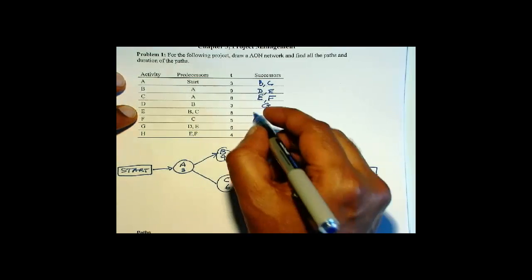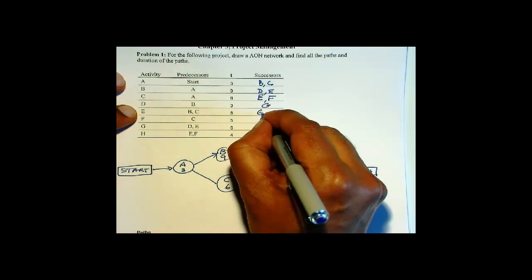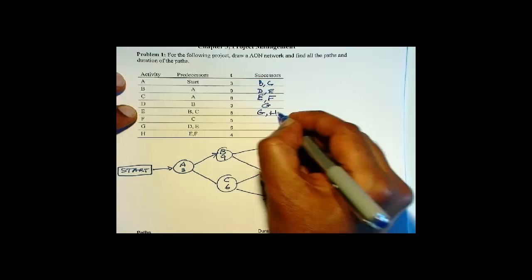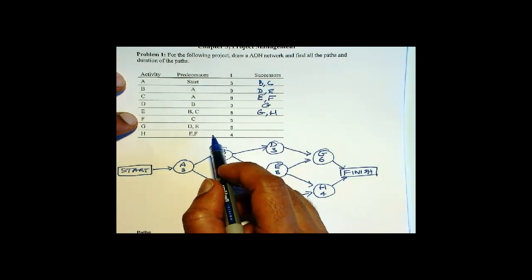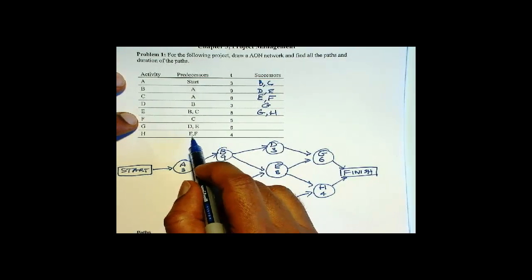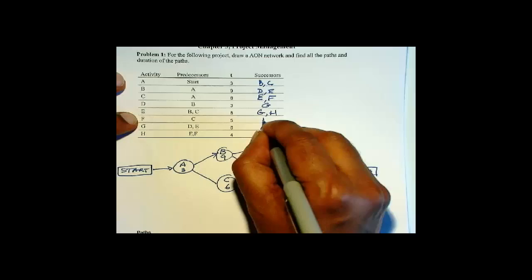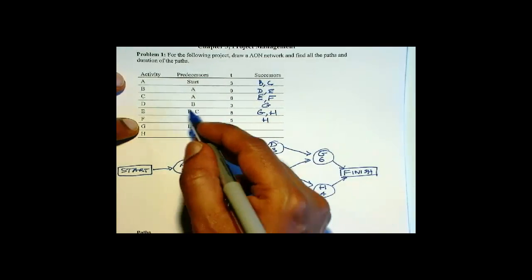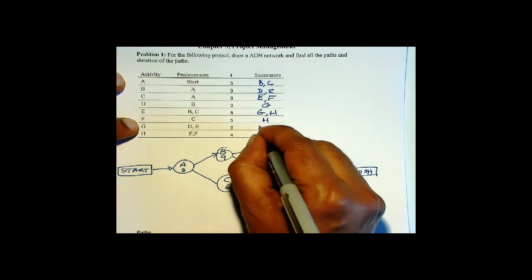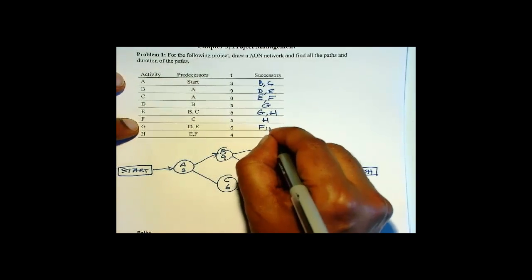F is a predecessor for H. G is not a predecessor anywhere, so that goes to finish. H as well goes to finish.